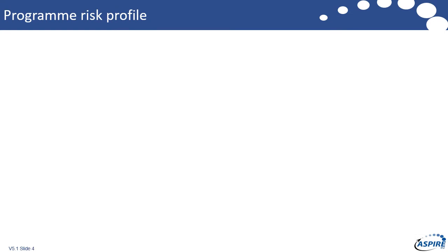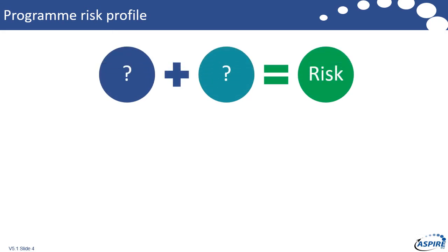So when we're looking at the risk profile of a program, there are two things that we have concluded that contribute to the overall risk. Firstly, there's complexity, which we've already explained, and secondly, the scale. Now, when people are looking at high-risk programs and big programs, they tend to focus more on scale than complexity. So scale is normally driven by cost and time and all that, and people say that's a big program. No, but actually, those programs can be big, expensive, but relatively straightforward.